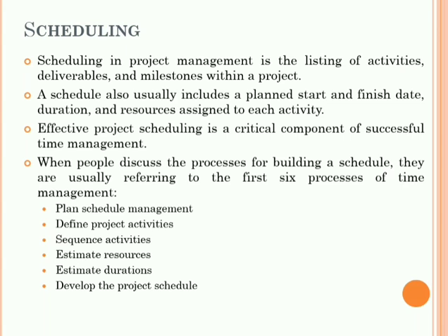First type, you can call it a master project schedule. A master schedule tends to be a simplified list of tasks within a timeline or the project calendar. The second type of scheduling is the milestone schedule or summary schedule. Here the schedule tracks major milestones and key deliverables, but not every task required to complete the project.